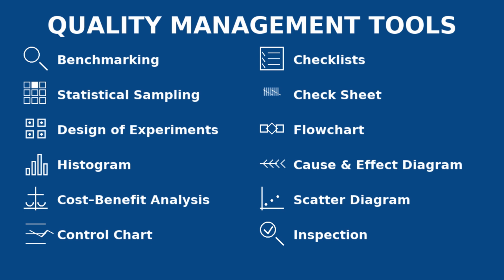We come across another project manager in the same room who is performing a particular action. An inspection has happened and defects are identified during inspection. This person is collecting data about the defects. What is he doing? Using a tool called check sheets. A check sheet is a real-time data collection form used to capture the frequency of defects. It is used to capture the frequency of issues or quality parameters.